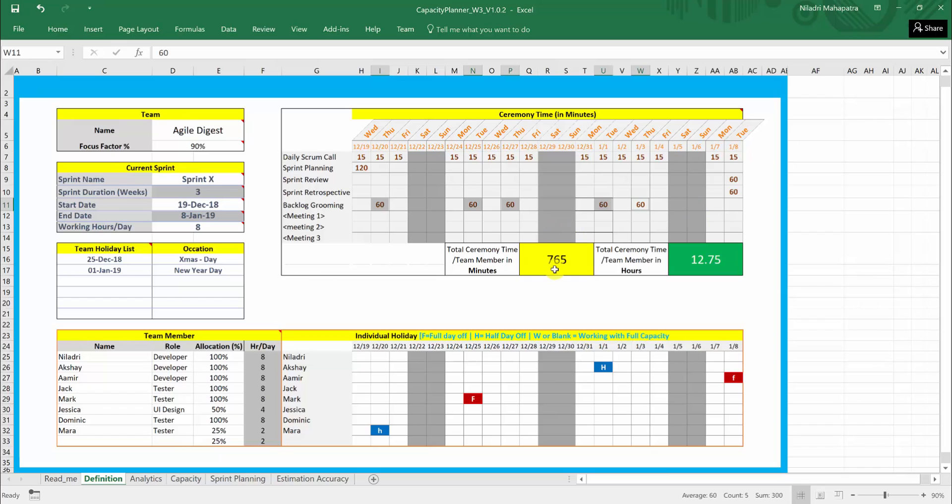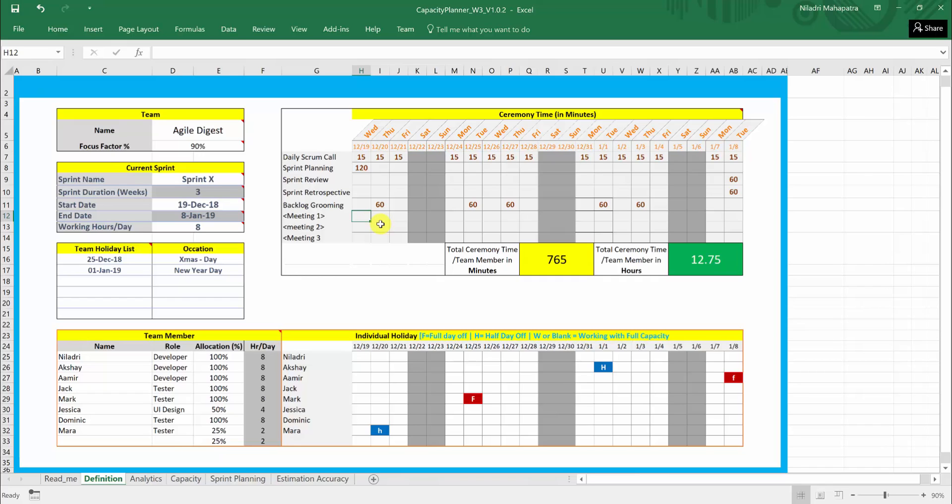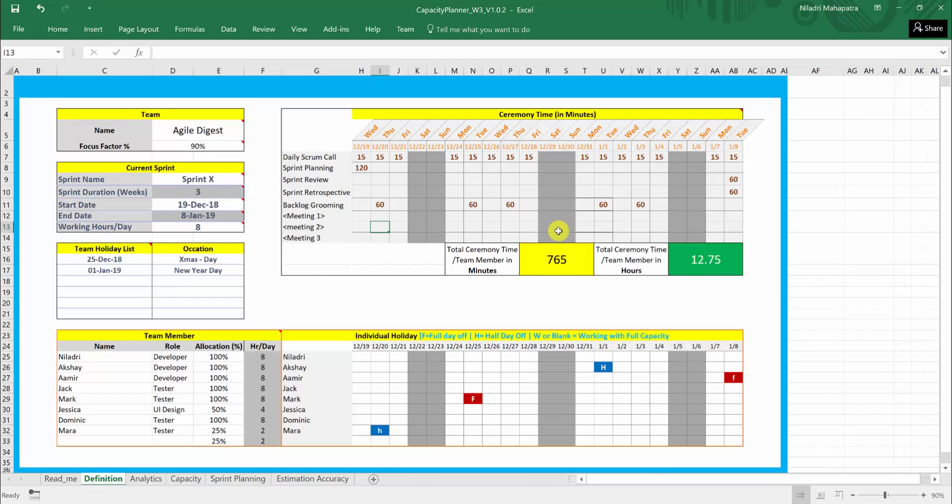Based on that, it calculate how many time you will be spending on this sprint on ceremonies and total how many hours is coming up to that. Now again, if you want to add some meetings within your sprint duration that is not your ceremonies but you have to attend that and you will be spending some times. There are three optional areas you can add the meeting name and the times accordingly which date it will be happening. Now you are done with your definition. Let us see how your capacity is coming up based on this sprint duration and this definition of your vacations and ceremony times. We will come to this analytics sets little later.